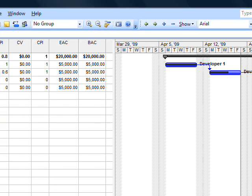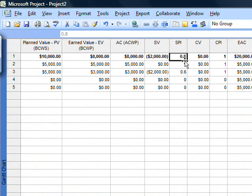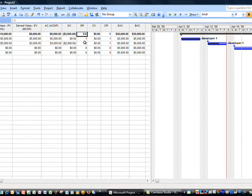Now, in the second week, pretend that I have only earned three days worth of work but I've finished my five days — I earned only three days worth of work in that second week. So I would have a schedule performance index of 0.6. My cumulative schedule performance index is 0.8. Something to note: the schedule performance index is important when it's on the critical path. Observe the critical path carefully. You may have a low performance index on non-critical path issues and it might be just fine. But as you watch the critical path — those tasks that are critical — take care of those first. They have, of course, the absolute greatest impact.